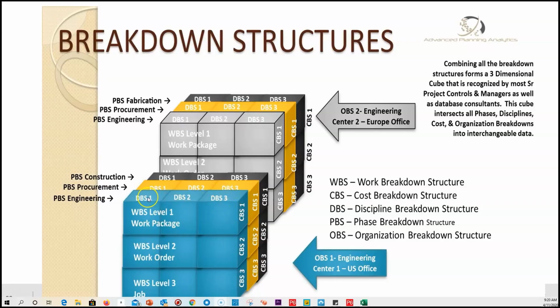So that means that this discipline, mechanical, has equipment that resides in the ISBL, OSBL Unit 1, OSBL Unit 2, and ISBL Unit X. And the piping discipline also has to design piping within each area. And the civil structural also has to put in foundations, for example, and steel for units 1, 2, and X. So their design falls in this slice.